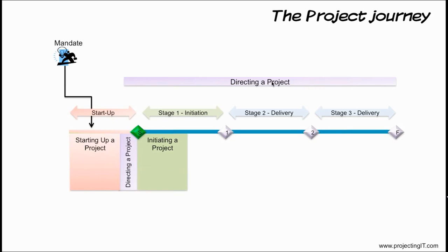As part of initiation, the project manager will use the initiating a project process to create plans for delivering the project. Initiating a project process involves activities to understand how the work of this project will be done. The project manager will use teams and company resources such as the knowledge base, templates, and processes to prepare the project initiation documentation, also called the PID. The PID tells how this project is being managed.